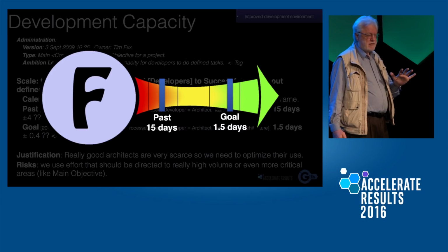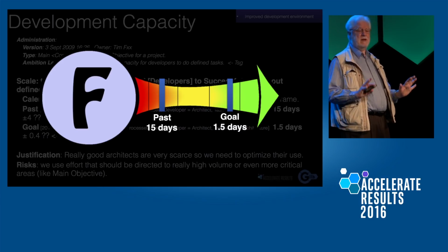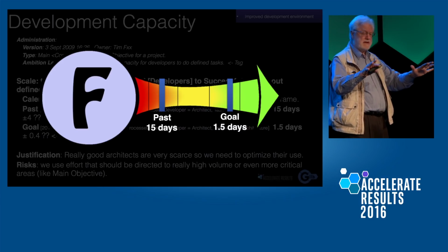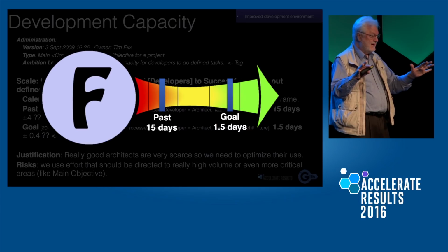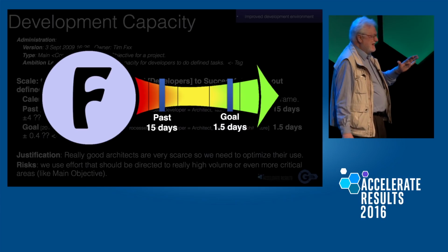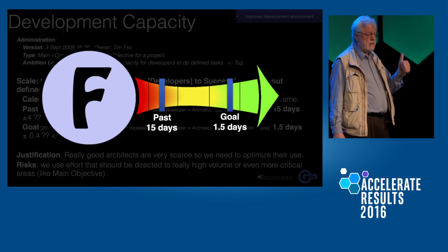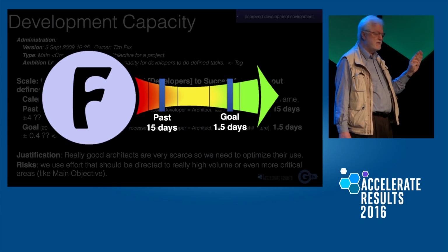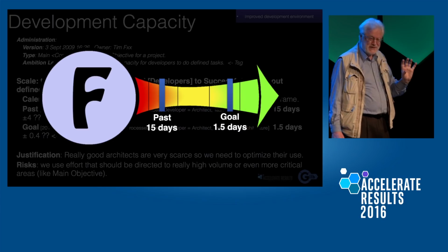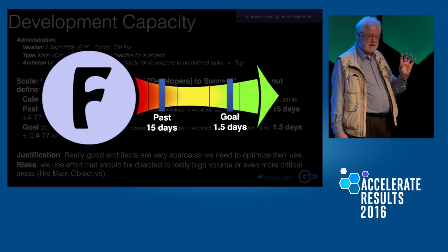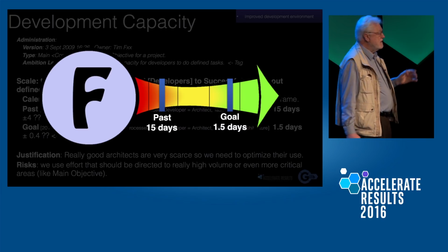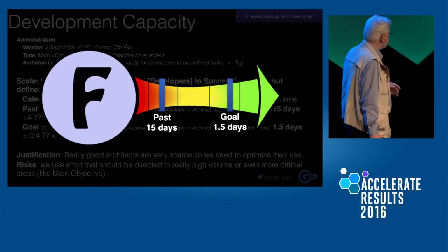All projects, all new products are about improving multiple characteristics of a system to be more competitive, right? Those characteristics need to be quantified at the outset. I believe they need to be quantified on the first day of the project because they're so fundamental to absolutely everything else. At least a draft of the quantified things on the first day. You can, of course, change them, modify them, rebalance them as you get more insights and go along.